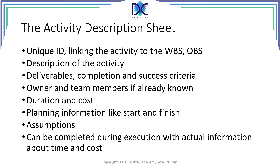It also includes the owner and team members if already known, as well as duration and cost — which may be determined later when we have more information about the people working on the activities. We may have planning information like start and finish, some assumptions we may include when describing the activity, and additional information that can be completed during execution, when we may have actual data about time and cost.